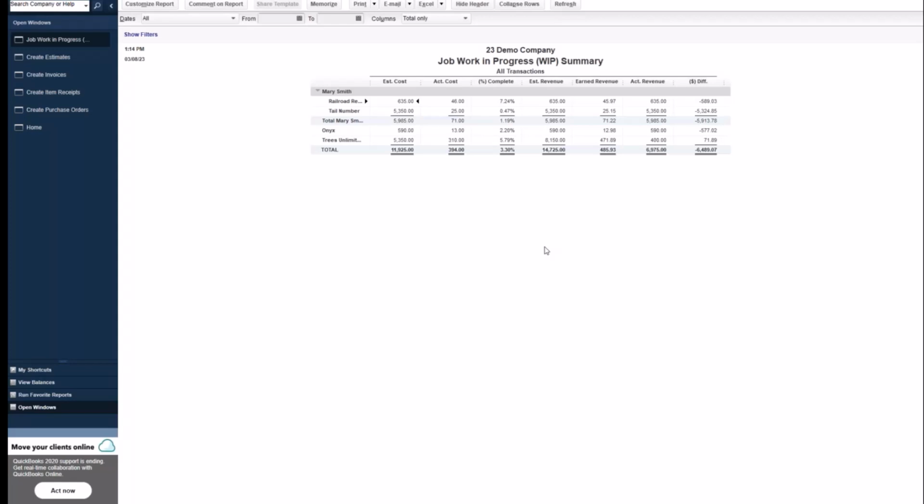I do have a company who regularly, about every 6 months, goes through their estimates and updates their estimates to make sure that these numbers are as accurate as they possibly can be because of all the material changes, because of labor changes, especially thinking about a 3-year contract, those are going to change regularly. And the purpose of this is to keep as accurate as possible the revenue recognition of the contracts.